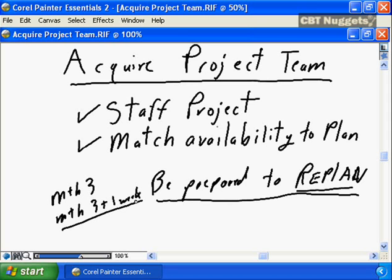Options are accept this. Options are go out to the marketplace and hire a new resource, provided the resource can be hired in the time frame required by your project. Go out to the marketplace and hire a temporary resource, a consultant, possibly paying a higher per diem rate to ensure the project delivers. So don't just accept staffing shortfalls. Replan, define the consequences, and then work with senior management, work with your project sponsor to find out what the right solution is going to be. Accept the delay, hire more people, bring in external consultant staff, but replan.